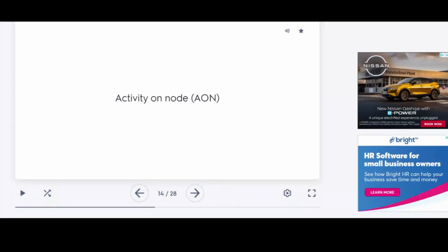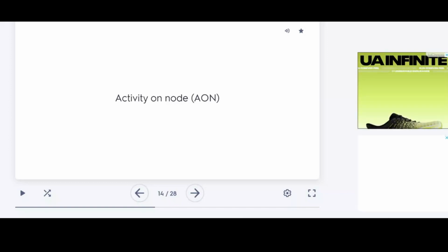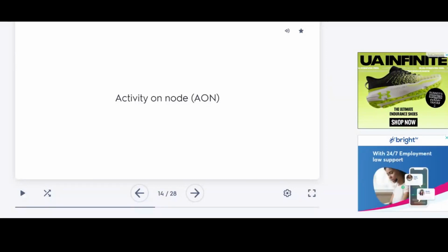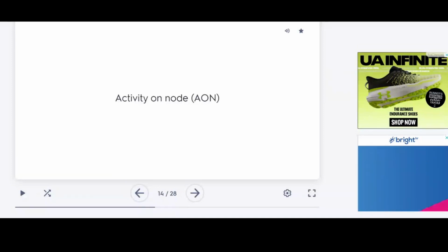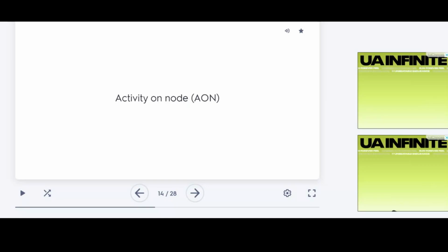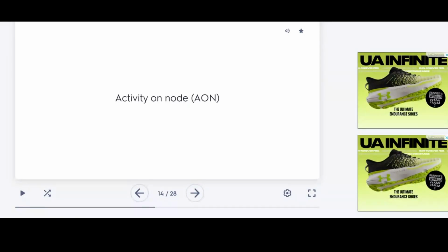Okay, remember the post-it notes, the yellow notes. Those are nodes. That's just paper to represent nodes. But in the network diagram, those boxes are nodes. But each node has a lot of information in it. Okay, it's not just a box. There are contents, duration, starting and finishing time, earliest starting and earliest finishing time, etc., and connections. So this node is basically one entity representing one task that needs to be finished, so it can help other tasks to be finished. So that's the node. When you are drawing a diagram or network, you will see how to put those nodes.